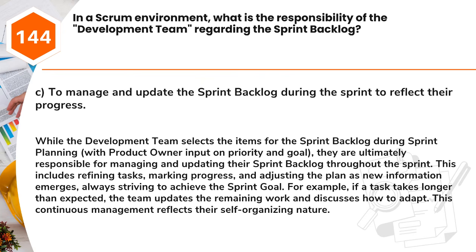This includes refining tasks, marking progress, and adjusting the plan as new information emerges, always striving to achieve the sprint goal. For example, if a task takes longer than expected, the team updates the remaining work and discusses how to adapt. This continuous management reflects their self-organizing nature.